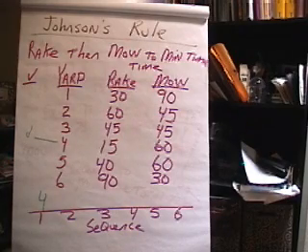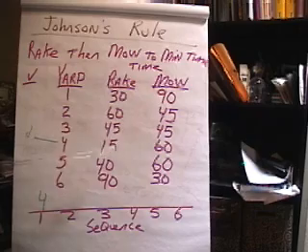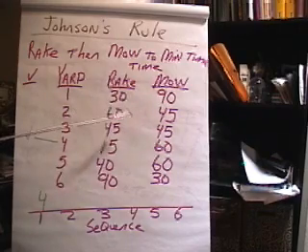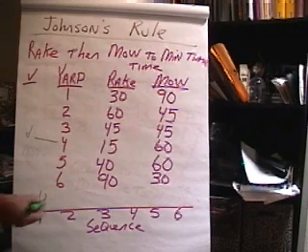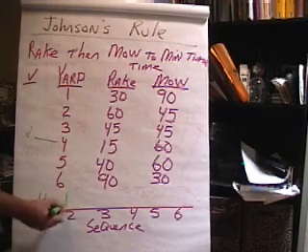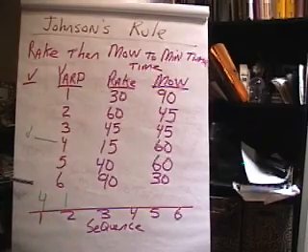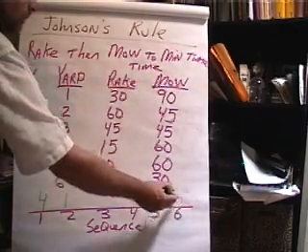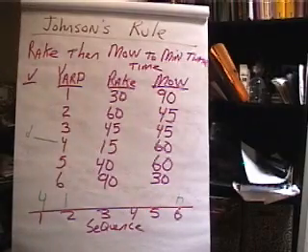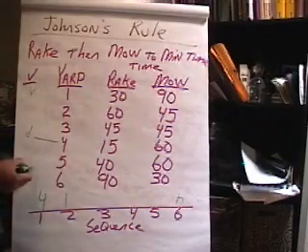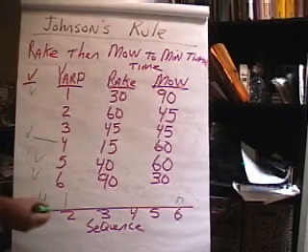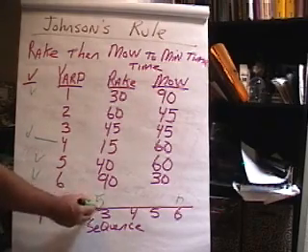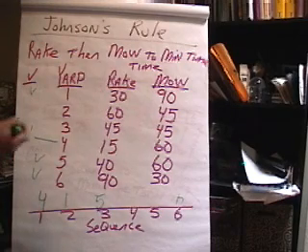So, okay, what's next? It appears that we've got a tie. 30 for raking is tied with 30 for mowing. So, yard 1 is on the first list, on the front of the list. Yard 6 is on the end. So check those out. Next is 40. So that's at the beginning of the list. We can check that off.